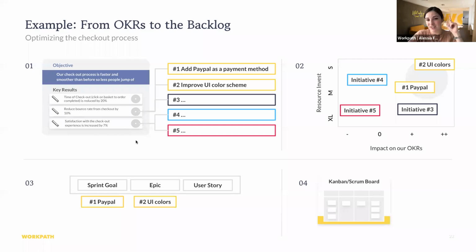maybe the option is that the initiative is important, but we wouldn't have a way to validate if the initiative was successful because there's no key result. So we probably should add a key result that measures the impact and success of that initiative. Ask yourself, how can we see if we're successful with that initiative? And then add another key result. That's what I would do. Or it shows me that the promises we're making in the objective are not mapped out with each key result. So to me, this is rather an OKR quality issue.